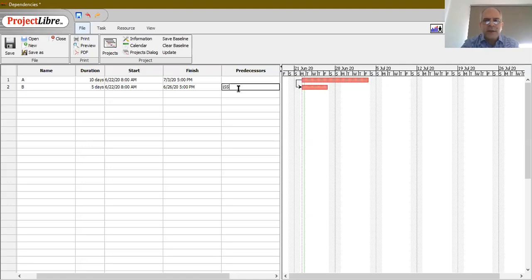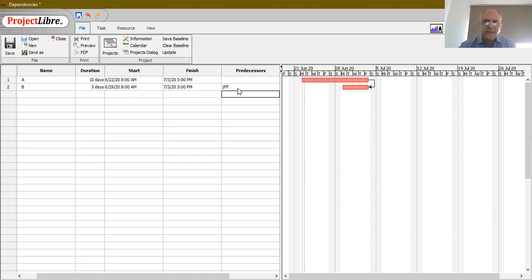For the opposite concern — where we don't care when A begins or how long it is, but want both A and B to finish at the same time — we can type 1FF and press Enter. The arrow moves from the left side of the bar to the right side, indicating the Finish-to-Finish dependency. The ending dates are now what matter, and that dependency is introduced as 1FF.